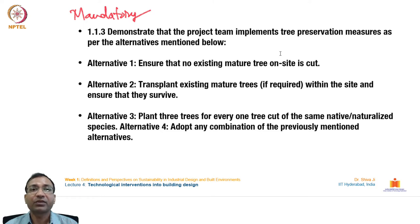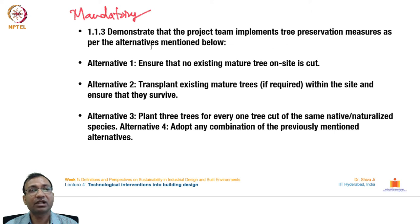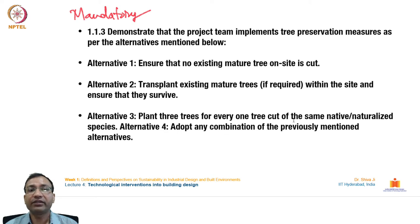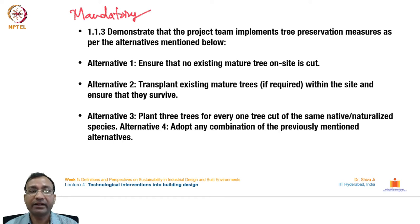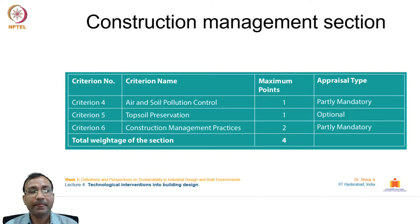Another mandatory criterion requires the project team to implement tree preservation measures. Alternative 1: ensure no existing mature tree on site is cut. Alternative 2: transplant existing mature trees within the site and ensure survival. Alternative 3: plant three trees for every one tree cut of the same native species. Alternative 4: adopt any combination of the above alternatives.